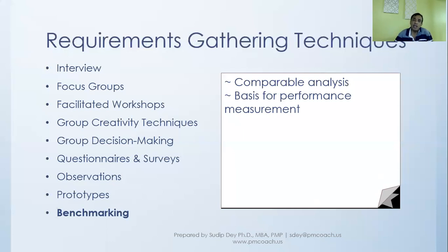In trying to figure that out, you don't have a realistic estimate, because this is something new that you're doing in the organization, and even the users are not aware, or have not used any such system. So in that case, you might look outside at some other similar system available in the market, and see what are typical response times.